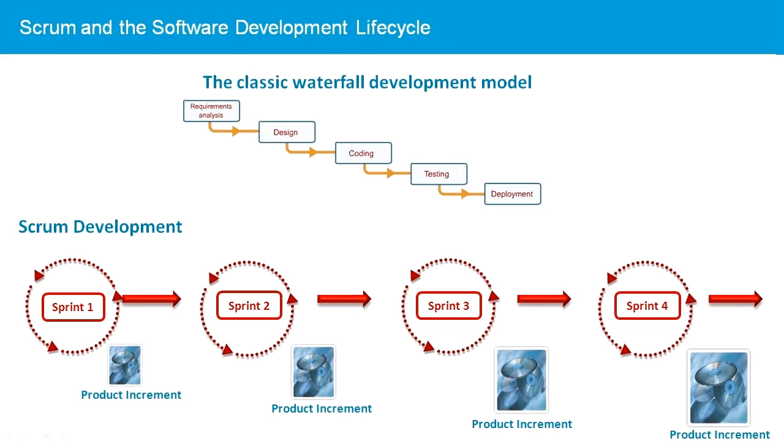At the end of each sprint, the customer sees a demonstration of the current product increment and gives feedback, allowing the team to quickly respond to changing requirements and ensuring the final product matches the customer's expectations. At the end of each sprint, a team retrospective is held on what went right and wrong with the last sprint to ensure continual process improvement.